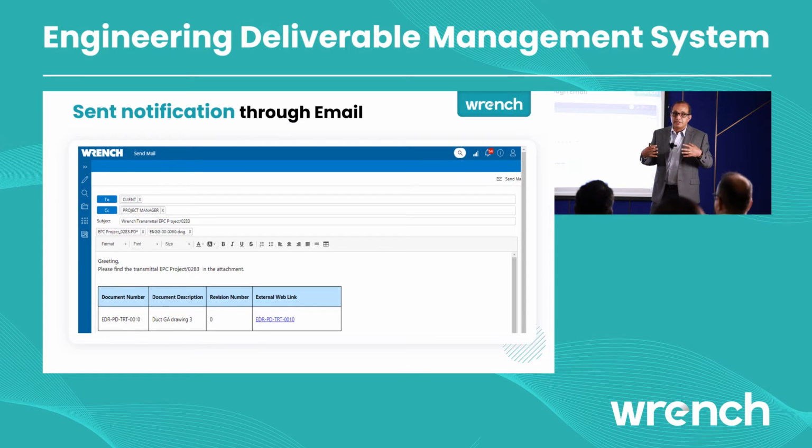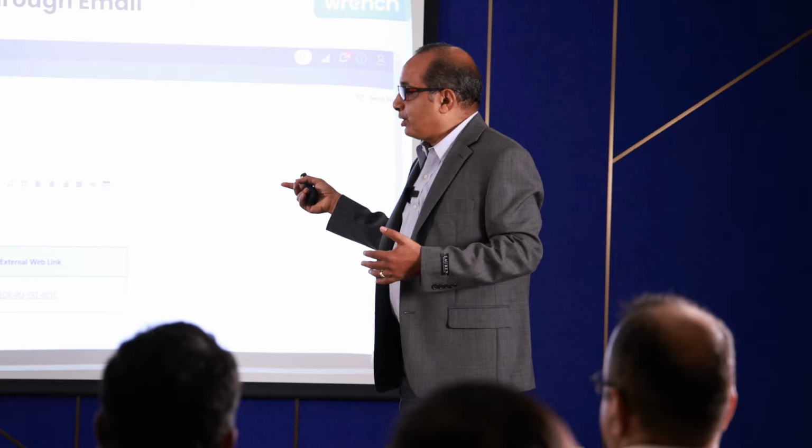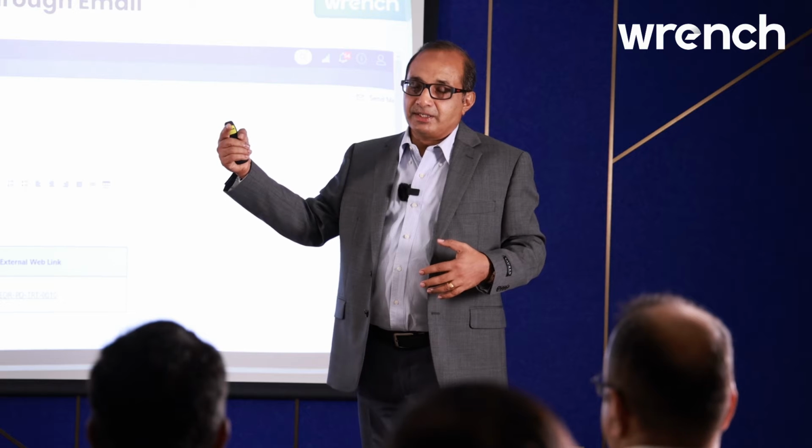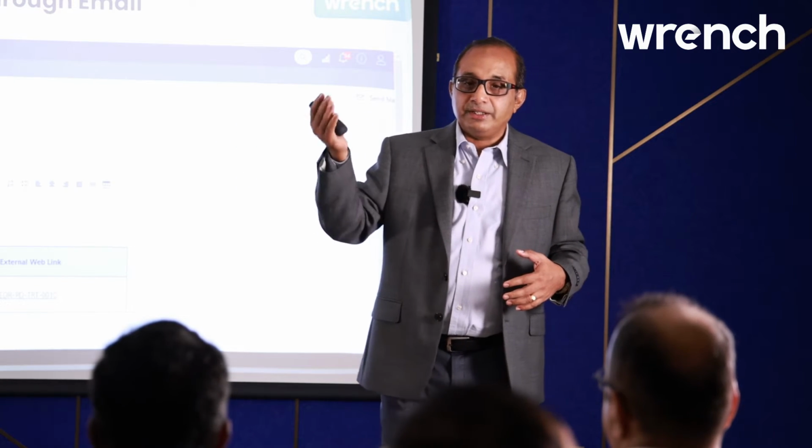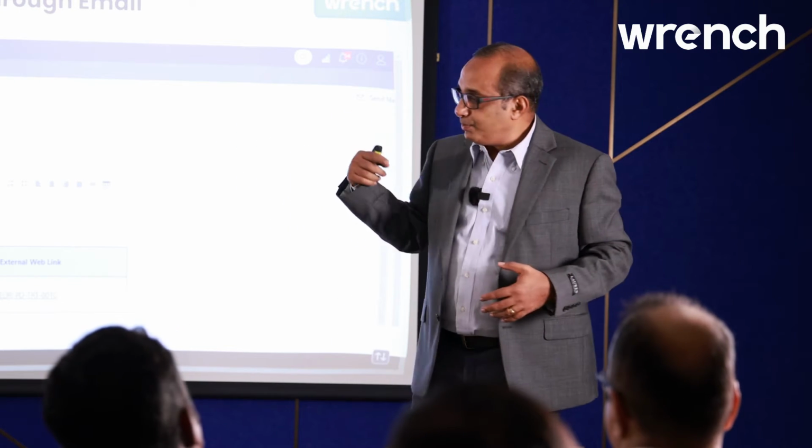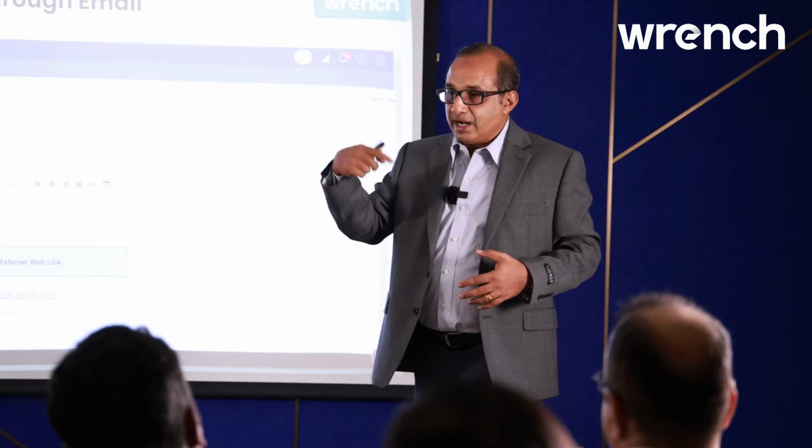But generally what happens is, when you're sending such drawings to a client, it can clutter his email. So what you do is, you don't actually send the drawing, you send a link of the drawing from our server, so that when they click on it, they can download it. Now, the advantage of doing that is, when they download it, you get an acknowledgement that the client has received it. And you have an aging date within which the client has to respond back to you.